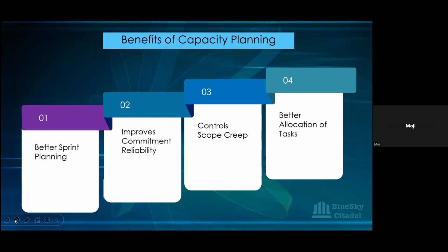So we'll be able to negotiate that with the PO, to say things like, we are aware of our capacity. We don't have capacity to work on this particular thing. If this story or requirement coming in takes priority over other things that we've taken into the sprint, then we need to take something out in order to accommodate whatever new thing you're bringing in. We need to take something out that will balance it. So if you're bringing in a story of 8 points, we're also going to take out 8 points so that we're still within our capacity to do what we need to do.